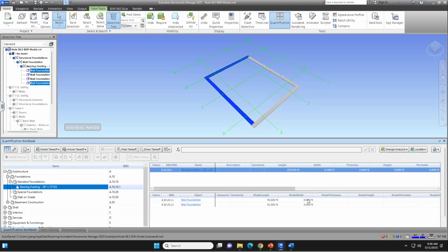And because it's foundation, it's concrete. So what we're doing in the takeoff is the volume of your concrete, right? So we still need to find another piece of information, which is the thickness, right? Do we have thickness information here? Where is it? You see your volume here? I should be scrolling down to, yeah. You have your volume here, and you don't have your thickness here.